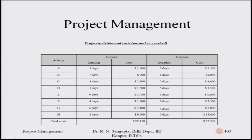In the table, activities are listed in the first column. Normal durations are: A = five days, B = seven days, C = three days, and so on. Normal costs in dollars are: A = one thousand, B = seven thousand, C = two thousand five hundred, D = one thousand five hundred, E = three thousand seven hundred fifty, F = one thousand six hundred, G = two thousand four hundred, and H = nine thousand.